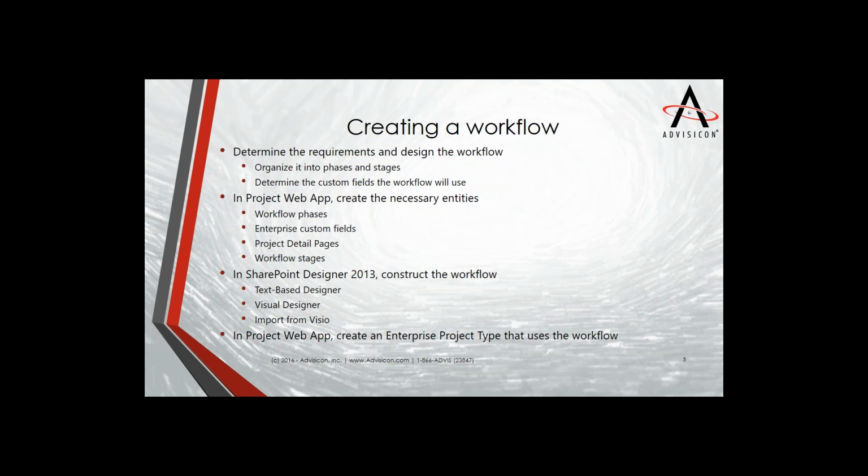You can do it using a visual designer, which is essentially like using Visio, or you can import your workflow from Visio, as I've mentioned previously, and I'll show you what that looks like also. Just a quick note, at present, your Visio version and your SharePoint Designer version need to be the same. So you'll see that I'm using Visio Pro 2013 along with SharePoint Designer 2013.